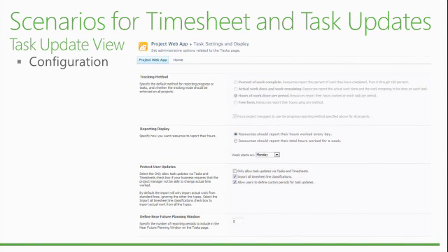Those two other options are import all timesheet classifications and allow users to define custom periods. With single entry mode, you probably don't need to check those off, right? No, you may want to, because single entry mode means you enter everything in the timesheet. So in the timesheet you could have the standard line classification or all of them, even the ones you have added as custom line classifications. So import all timesheet classifications must be check-marked with single entry mode.